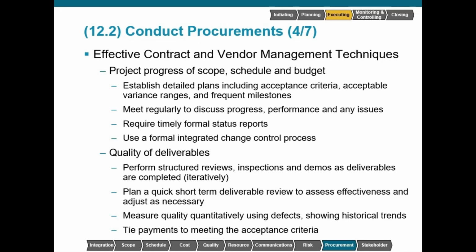We will require timely formal status reports and the use of a formal integrated change control process, very similar to our own. We will expect quality of deliverables. We will perform structured reviews, and since we are independent of their organization, that would be a structured independent review or a quality audit.